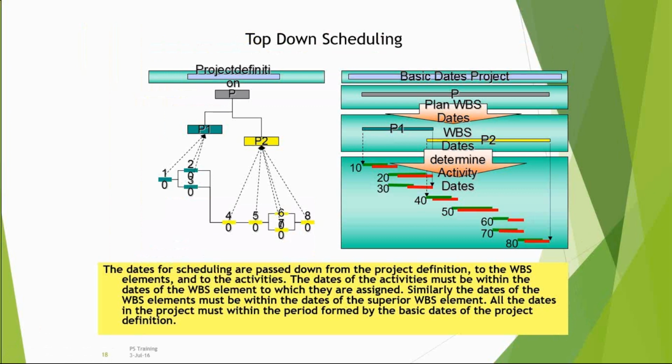The dates of scheduling are passed on from the project definition to the WBS elements and to the activities. Data of the activities must be written with the dates of the WBS to which they are assigned.